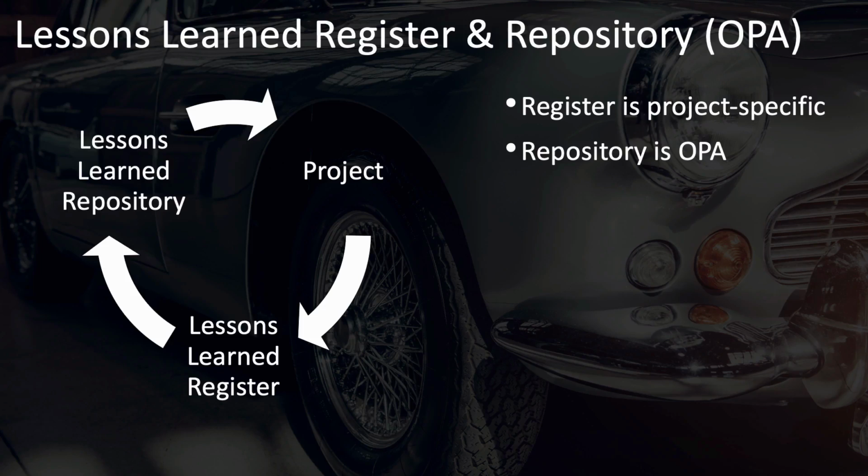The key points to remember are that the lessons learned register is specifically for your project, that the lessons learned repository is a shared organizational process asset, and that moving lessons learned from the register to the repository happens during this process, close project or phase.